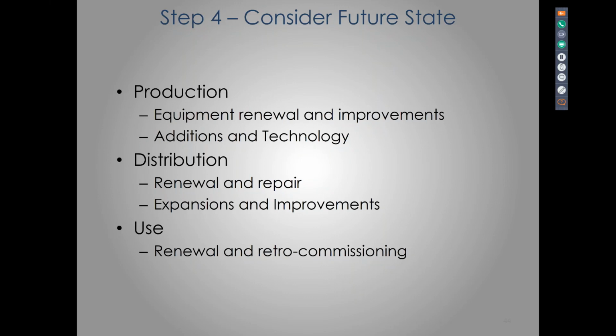And Henry, that also goes into the deferred maintenance of the building itself. Having a solid 10-year plan in place to address the deferred maintenance needs: air handlers, electrical upgrades, elevators, plumbing challenges, roofing. When you have those all prioritized and broken down, at the University of Arizona we do an annual deferred maintenance review. A third party comes in, but our staff also have a wealth of knowledge on that. And we're benchmarking our dollars, our operational costs, and our utility costs against universities throughout the country.